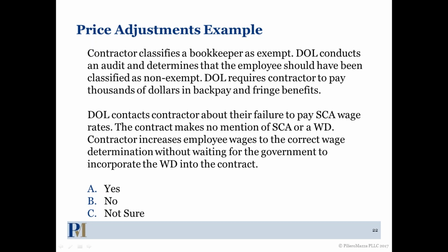And we see this issue all the time, especially when new wage determinations come out in the summer and someone says, well, I just apply the new health and welfare rate, right? No. If you want the price adjustment, you've got to wait for the incorporation of that new wage determination into your contract.